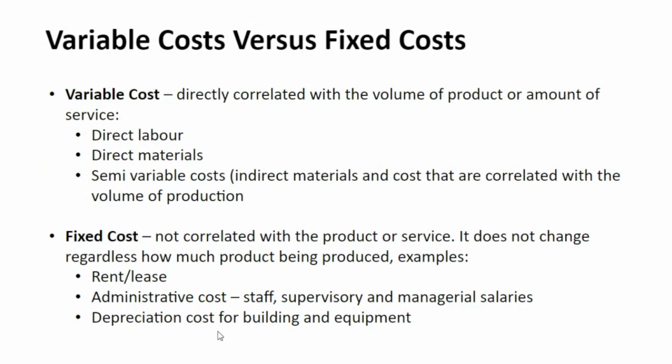And we have this thing called depreciation. As I say, that lathe of yours that cost $20,000, if it lasts you 20 years, effectively you have to take $1,000 a year. And this is effectively what depreciation is. It's just apportioning how much of that machine is worn out and how much value it decreases every year that you use it. Normally depreciation is calculated like that. It's what's called straight line depreciation, where you have a piece of equipment and you say, okay, it will last me 20 years, so every year I'll deduct 1/20th of it. There are other methods too, but the basic gist of it is that you're charging off some of that fixed cost.